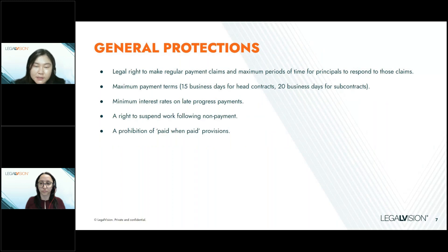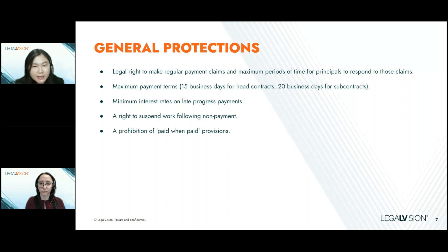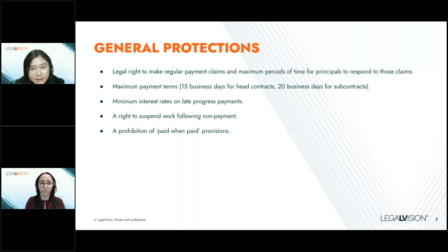The SOPA regime provides a statutory right to make regular payment claims and helps contractors get paid quickly. The legislation imposes strict deadlines for principals or head contractors to respond to those claims. If they miss the deadline, they're required to pay the payment claim in full. The legislation also allows contractors to charge interest on late progress payments, imposing a minimum interest rate on the debt, and allows contractors to suspend works if the principal or head contractor fails to make a progress payment.